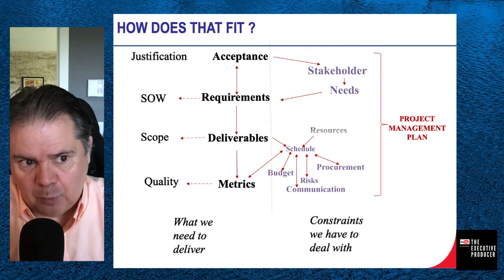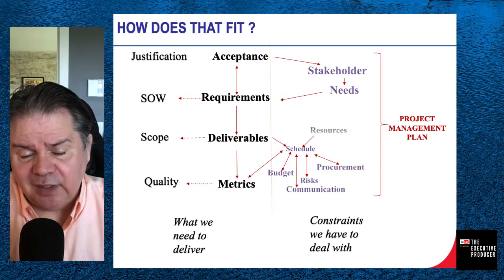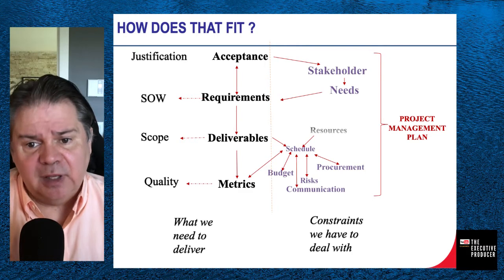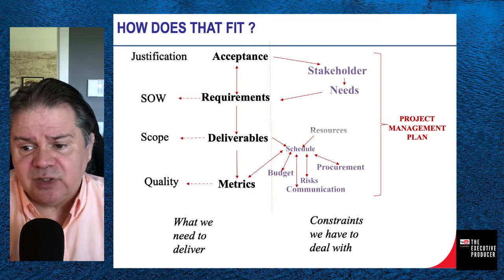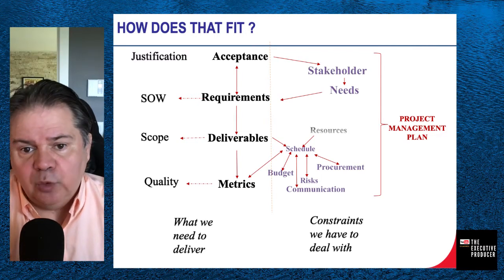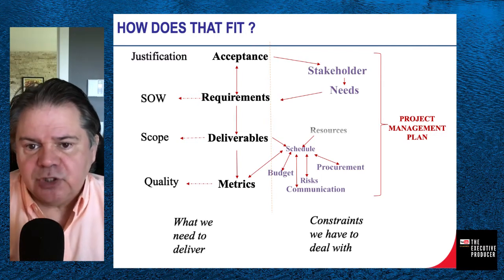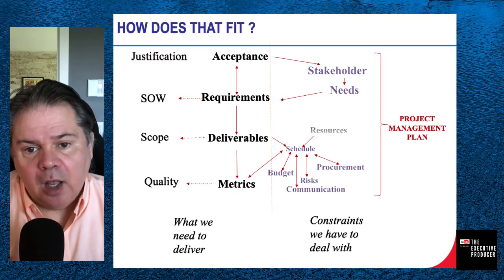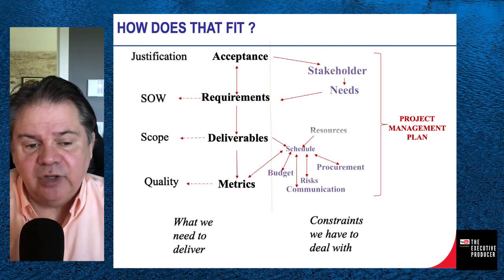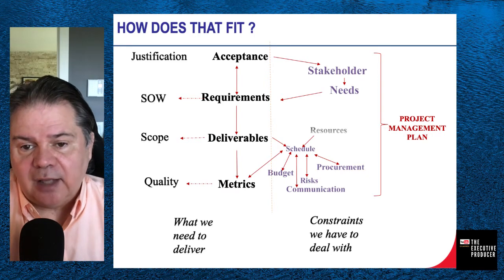That becomes our scope. And then we're really ready to deal with the constraints. The first constraint is the timing aspect, and the most important piece, which is all the activities that are required to produce these deliverables. We identify them using the decomposition technique. We sequence them, using different types of sequencing. You can see that in the schedule video. And then we start allocating resources.